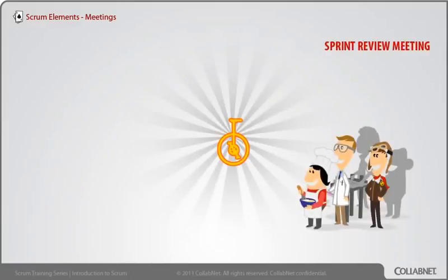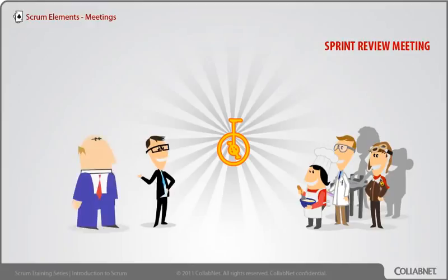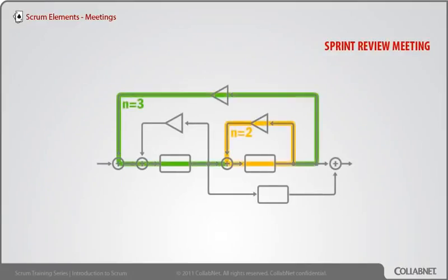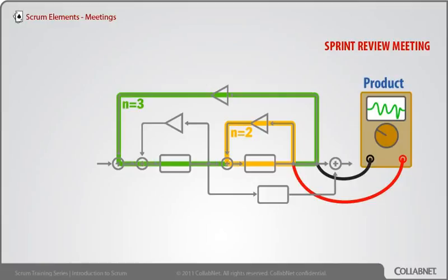At the sprint review meeting, the team demonstrates a potentially shippable product increment to the product owner and anyone else who's interested. People are sometimes called stakeholders. The product owner will declare which items are done, which items did not meet their acceptance criteria. We can measure velocity and we'll get feedback from stakeholders about how we're doing with that. A lot of times the feedback is, hey guys, you did what you said you'd do, but now that we see it, we realize we need something else. And we couldn't have known that until we saw the wrong product. People seem to need a piece of functioning software to react against before they can specify what they really want. Regular sprint review meetings provide a feedback loop about the product and its requirements.